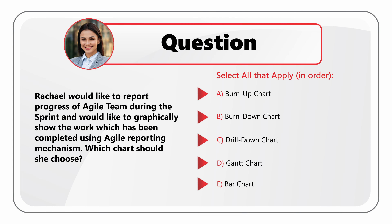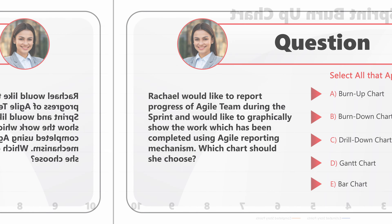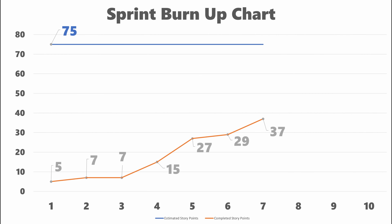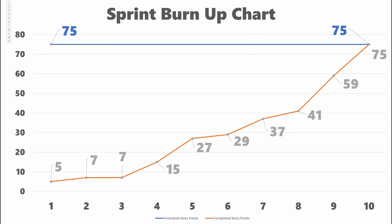I think the correct answer here is Choice A: Burn-up chart. The burn-up chart represents how much work has been completed on the project. It typically shows how many story points were estimated for the sprint and how many of them were gradually completed throughout the sprint.